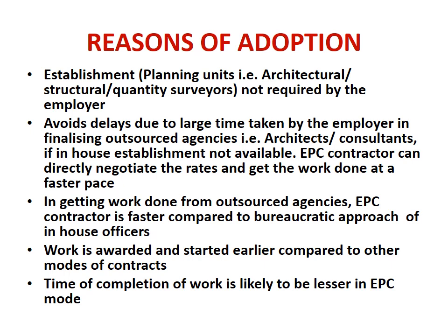Then somebody may ask the question, why are we adopting an EPC contract? An EPC contract has some advantages also. One advantage is that the establishment, that is planning units, that is architectural, quantity surveying and engineering staff, is not required by the employer. So that establishment is not required.